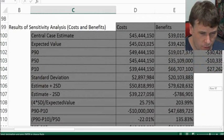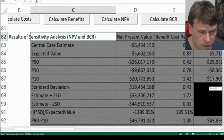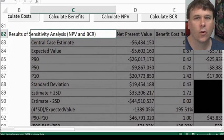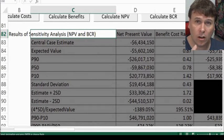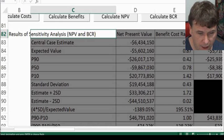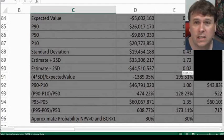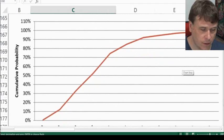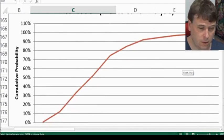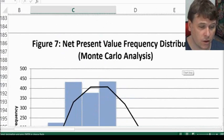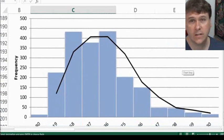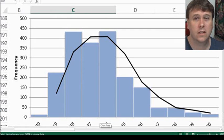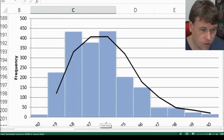You'll notice with the P50 that your P50 is actually lower than your expected value. So the expected value is expected to fall somewhere between your P50 and your P90 — a lot closer to your P50 generally, probably between P50 and maybe P70 if we calculated one. Going down to our Monte Carlo simulation, we've got very similar graphs — this should look almost identical. The Monte Carlo simulation gives us a much smoother distribution than what we got with our probability calculations, because we're doing 2,000 iterations of results rather than one-off calculations.